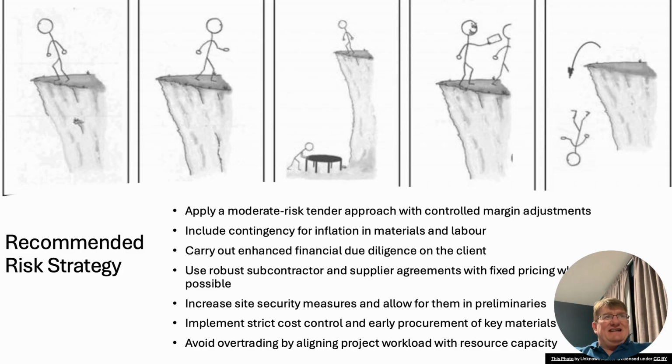I wouldn't call it sophisticated, but a raft foundation is a little bit more sophisticated than a trench foundation or a strip foundation. Fixed price will be fine with this one. Increased size, it depends on where it is, and early procurement maybe. Key materials there are brick and block really. There's not that much concrete ultimately. Relatively speaking, it's not a road project or a bridge building project or a concrete frame building or anything like that, so it's quite a small to medium risk.